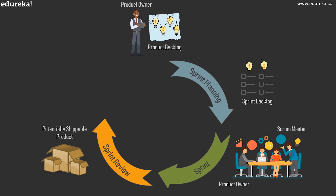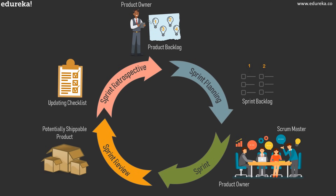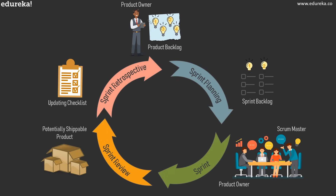Unlike the waterfall approach where you have a final product only at the end, in Scrum you have a properly functioning product at the end of every sprint. After the sprint review, the development team gathers in a sprint retrospective meeting, where they discuss what they did well and what they could have done better — such as tech limitations or overloaded team members — and decide how to improve efficiency. The entire cycle starts with sprint planning and ends with the sprint retrospective, repeating until the deadline is reached, the budget is exhausted, or the Product Owner is satisfied.